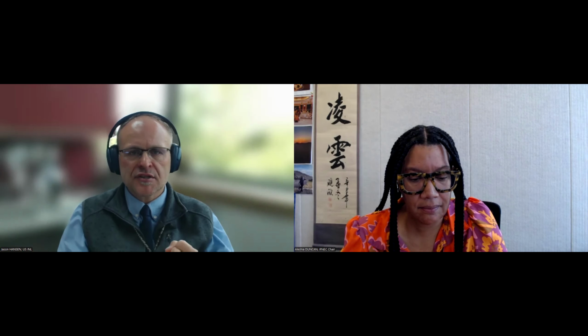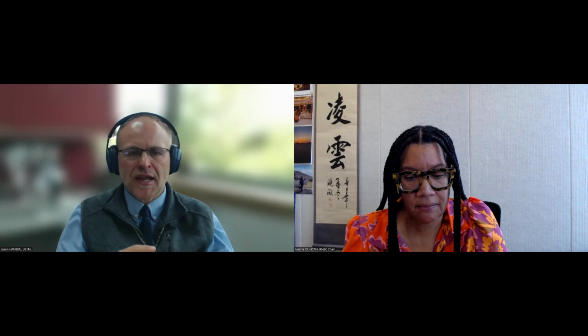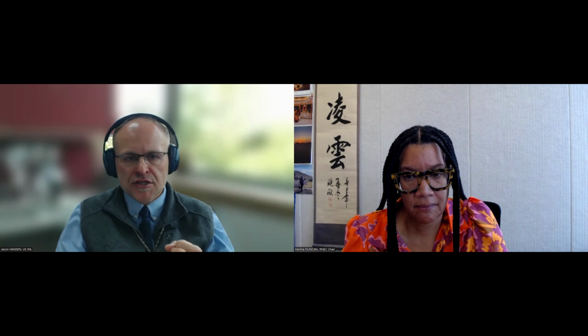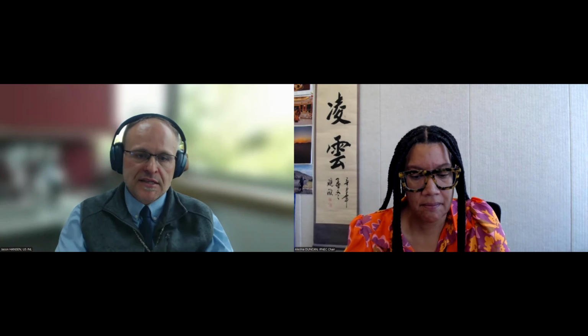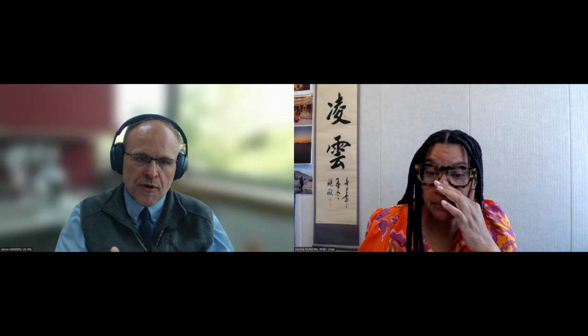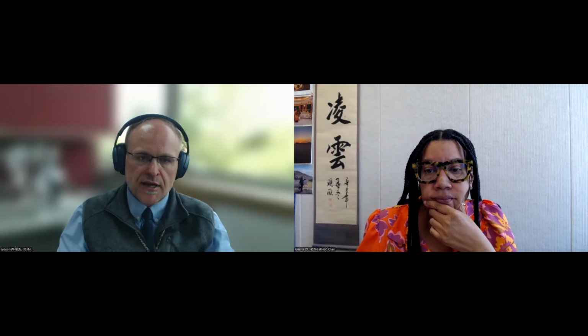How does the role of design maturity, the role of the construction firm, the role of interest rate, the role of supply chain stability, all these different factors, impact that transition period? That's going to ultimately answer the question: how long does it take to get from first of a kind to nth of a kind? But I'll just say that in the literature, because I can't give you a solid answer, people are talking about between 3 and 4 reactors up to as many as 10 reactors.